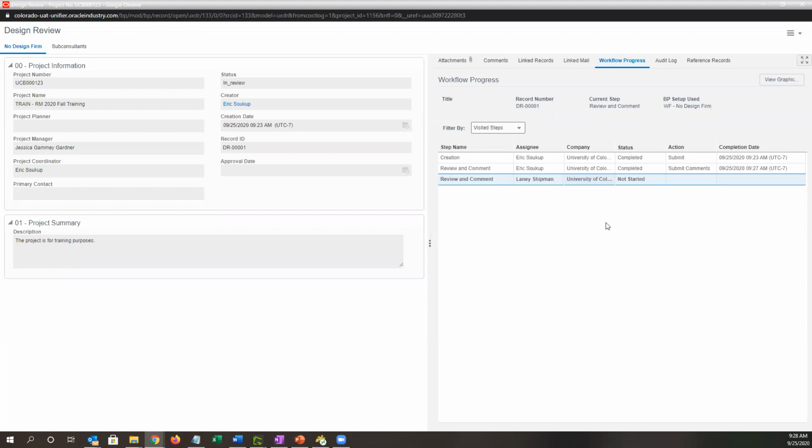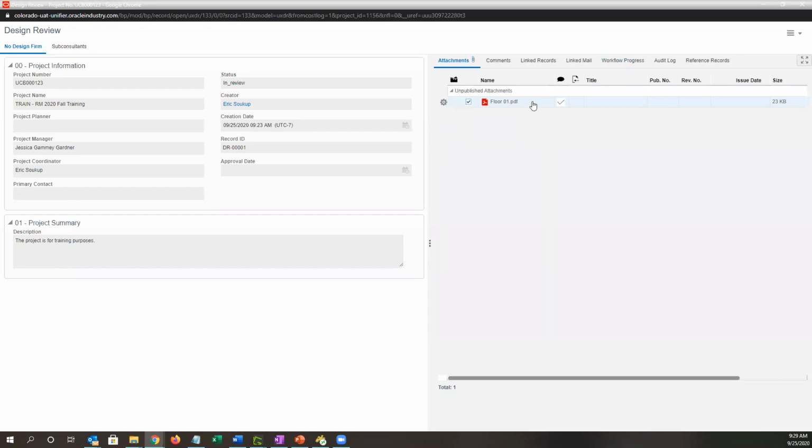So Laney, I'll have you go ahead and complete your step. Now, we don't necessarily need to wait for everyone to be done in order to see the comments. So as soon as I've submitted my comments, those are visible here on the PDF. I just won't see Laney's until she submits. She can see mine because I've submitted them. So that's something to be aware of. If you send it to multiple reviewers, they can see the other reviewers' comments once they have submitted them, meaning they've sent the task or they sent the record back in workflow.